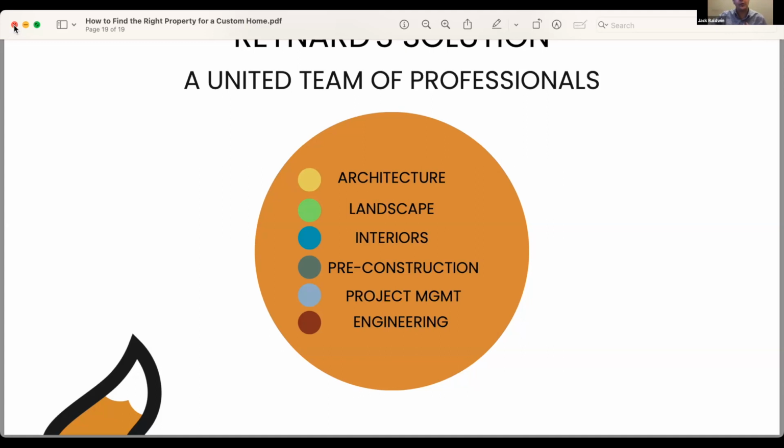But then we were beholden to make those changes and augmentations so that they could get what they wanted. We felt it was incumbent upon us to do that. And so to avert that challenge is kind of what I've been saying for the last 30 minutes: understanding and designing with your budget, so that when we stop at each phase, we do 4 phases of work. And at each phase, we stop and review, are we within budget before we go on to the next? And then we proceed.